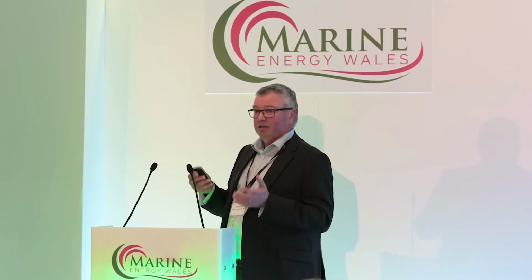All right, really the work packages. Essentially, there are 3 main work packages. It's the civil works, which part of that is your main civil works, your ancillary civil works, your marine works, and in that you've got your permanent seawalls, and then you've got the temporary cofferdam in which we build the structures, and then lastly, but most importantly, are the turbines, because they're the actual thing that generate the electricity. You've got the turbines, and associated with that, although not part of the main contract works, we've got the turbine manufacturing plant.